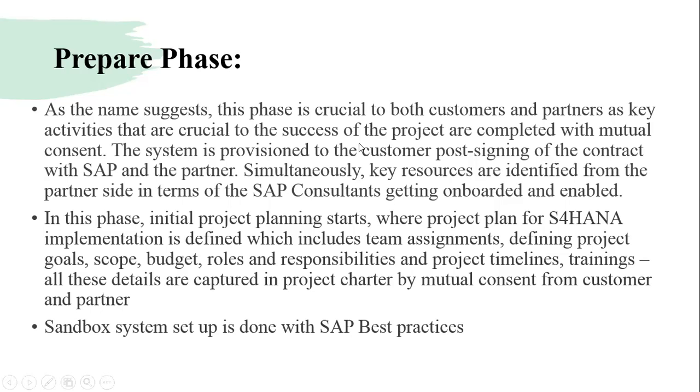With mutual consent, the system is provisioned to the customers post-signing of contract with SAP and partners. Simultaneously, key resources are identified from the partner side in terms of the SAP consultants getting onboarded and enabled. In this phase also, the initial project planning starts, where